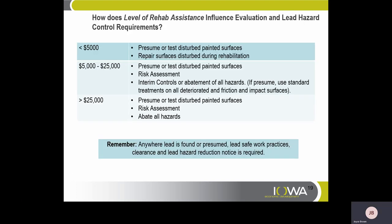How does the level of rehab assistance influence evaluation and lead hazard control requirements? For projects $5,000 to $25,000, you may presume or test disturbed painted surfaces, conduct a risk assessment, and if presumed, use standard treatments on all deteriorated and friction and impact surfaces. For projects greater than $25,000, you may presume or test disturbed painted surfaces, conduct a risk assessment, and abate all hazards. Remember, anywhere lead is found or presumed, lead-safe work practices, clearance, and lead hazard reduction notice are required.